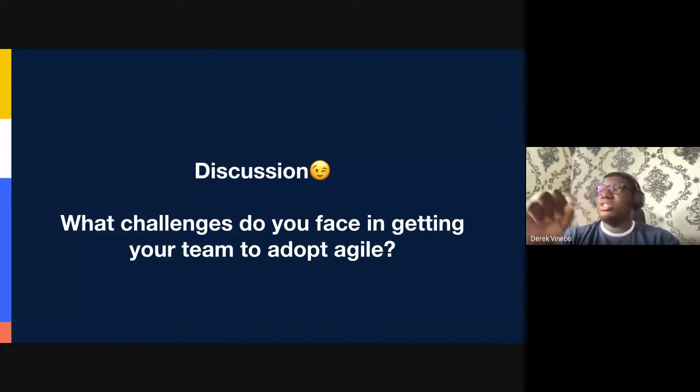Now, if for some reason you need to bring in a new ticket from the backlog, which is a bug, into your sprint, which is highly frowned upon in Scrum, right? Because you do not distort the nature of the sprints for any reason. But for some reason, it's important to be flexible and do that. If that bug is 3 story points, or if that bug is 4 story points based on the complexity, you have to immediately prioritize those 4 story points on your current sprint backlog.